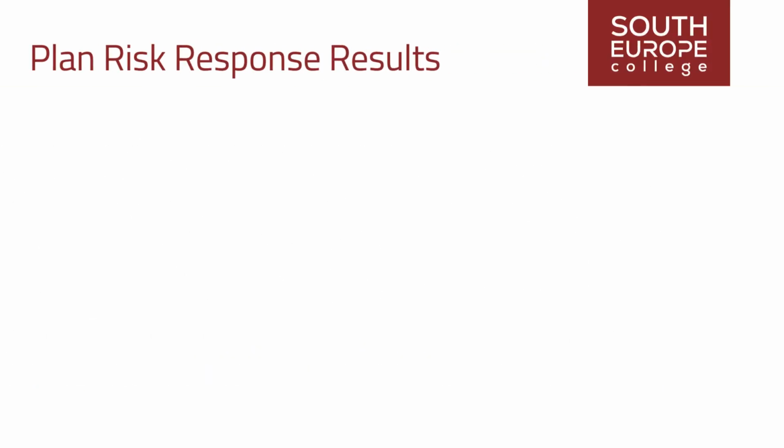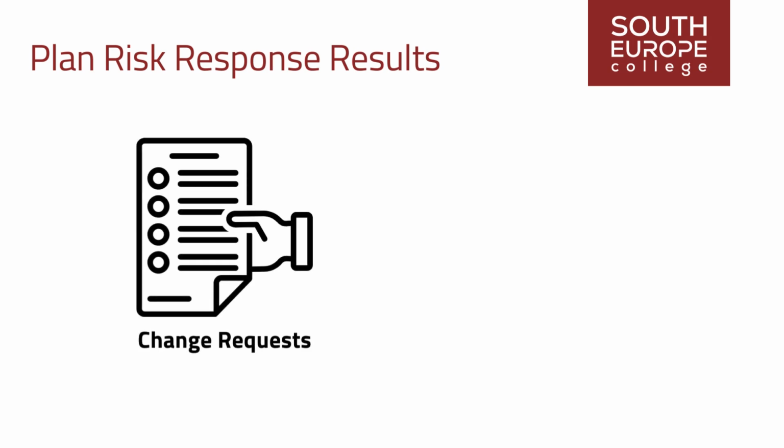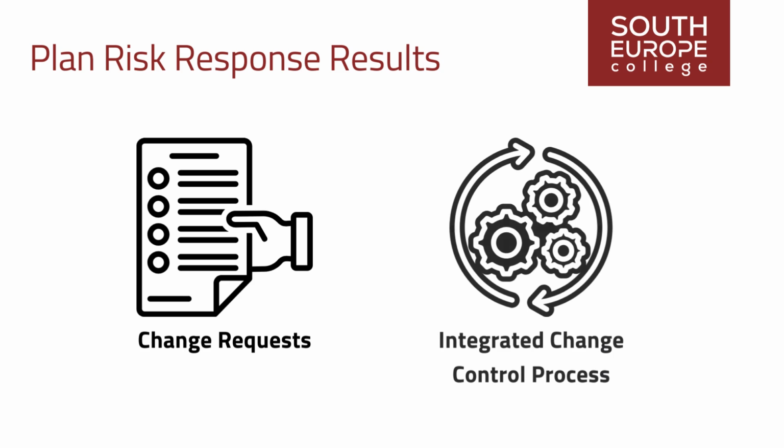As a result of the plan risk response process, some change requests may arise to the cost and schedule baselines or other elements of the project management plan. These change requests undergo review and disposition through the Perform Integrated Change Control process.